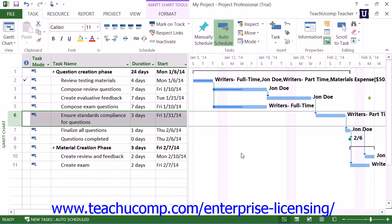While you can manually edit the assignment details directly to account for the actual work, you can also apply work contours to tasks that have a fairly predictable workload to distribute the workload over the task duration.